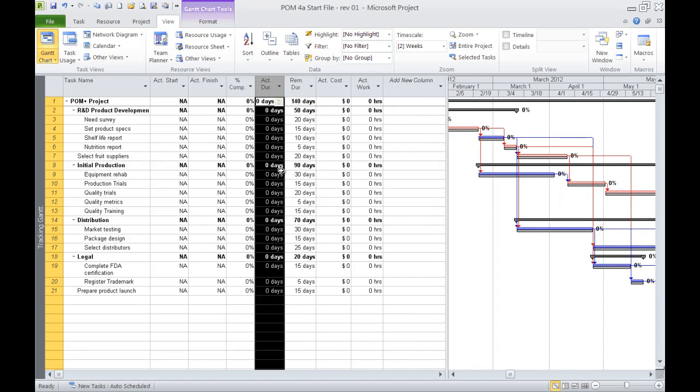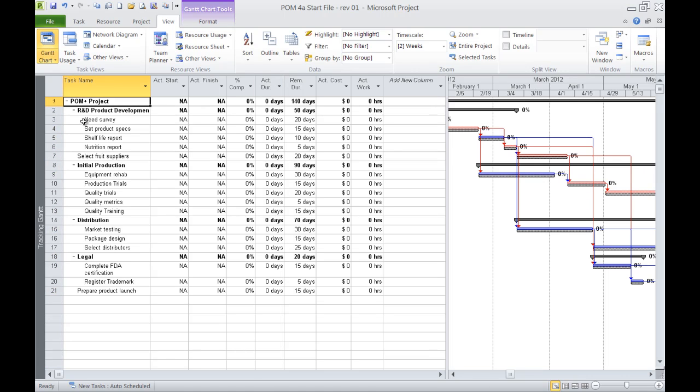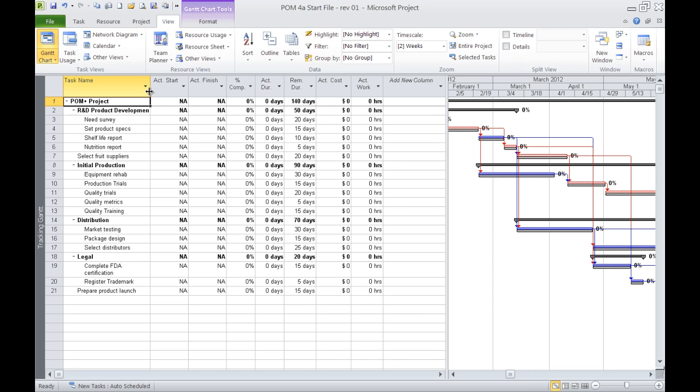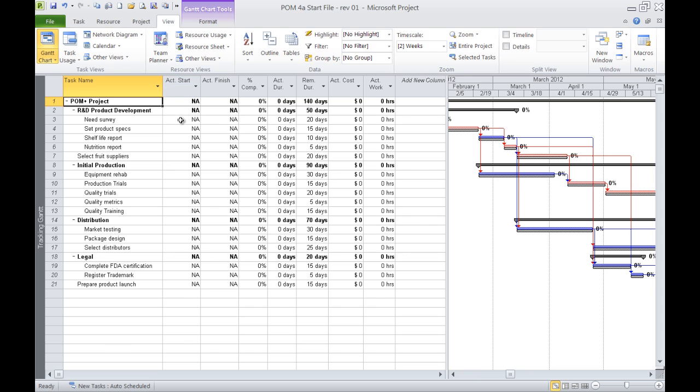and then I'm going to explain physical percent complete. Let's say you're putting down a pipeline, and you really don't care about all these individual tasks. You want to know how many miles of pipe have been put down, and your pipeline's going 100 miles. So for your physical percent complete, you would say, I've gone 10 miles, so I'm 10% complete. I've gone 15 miles, I'm 15% complete. It's just a different way to manage your progress. So you'll either use the time relationship, or you can actually use, as it says, a physical representation of how far we've progressed.